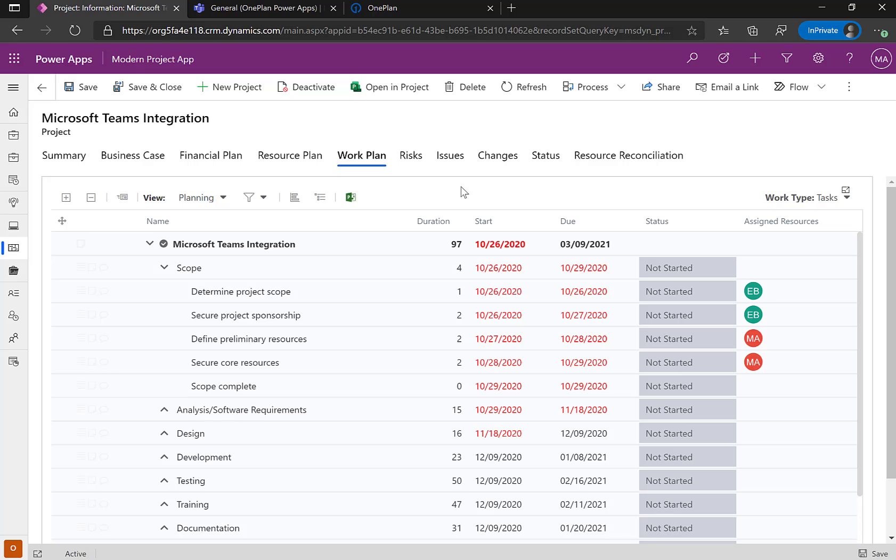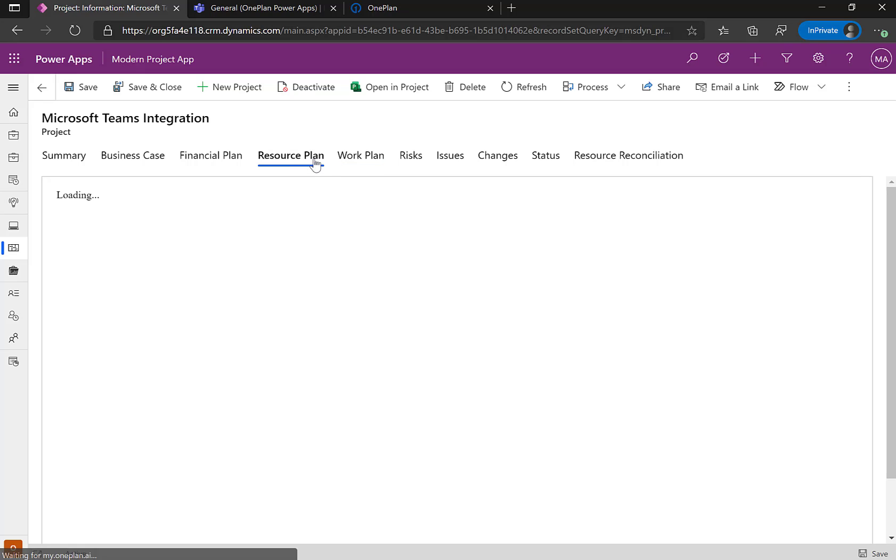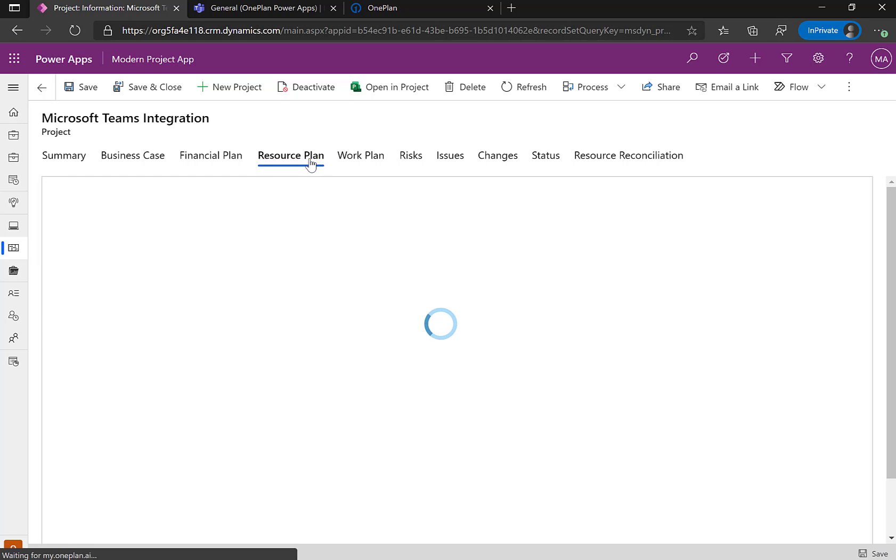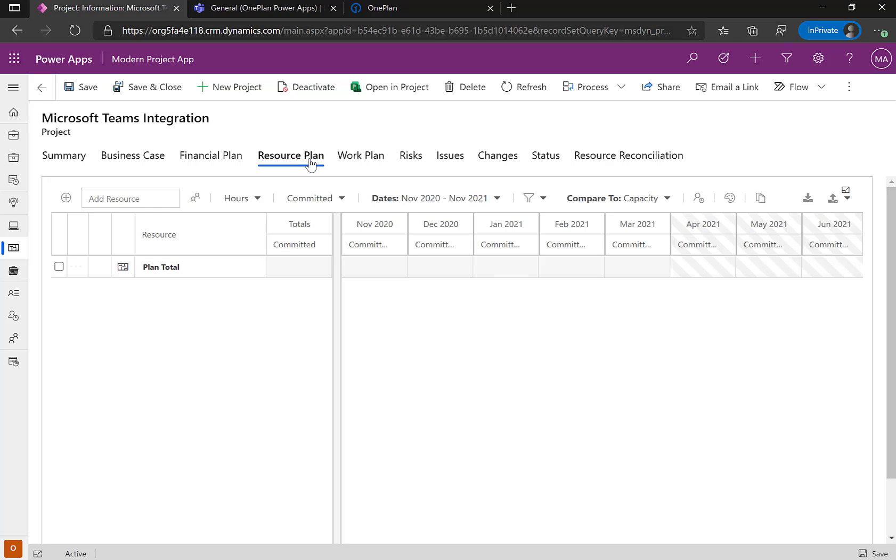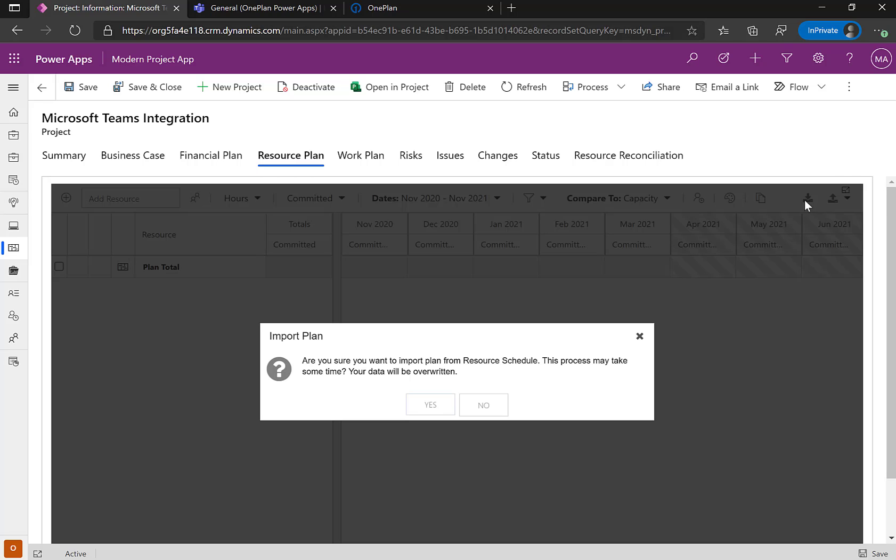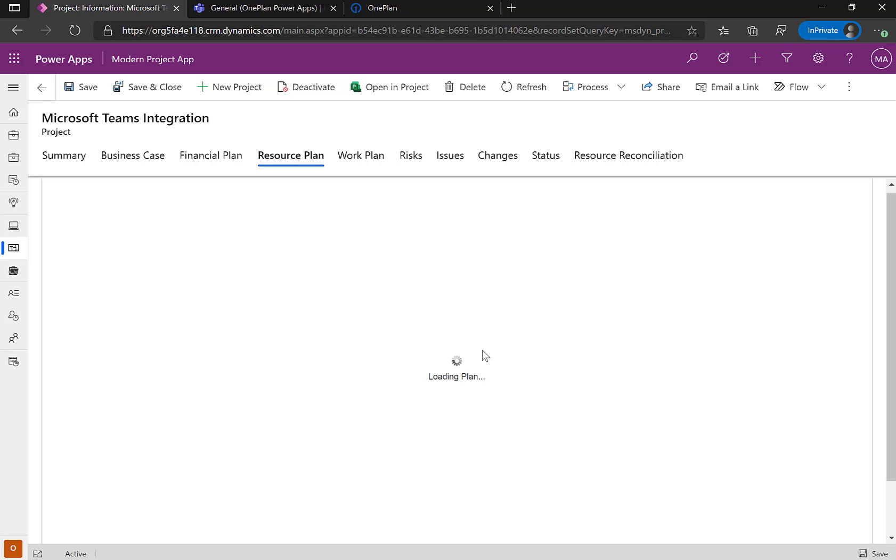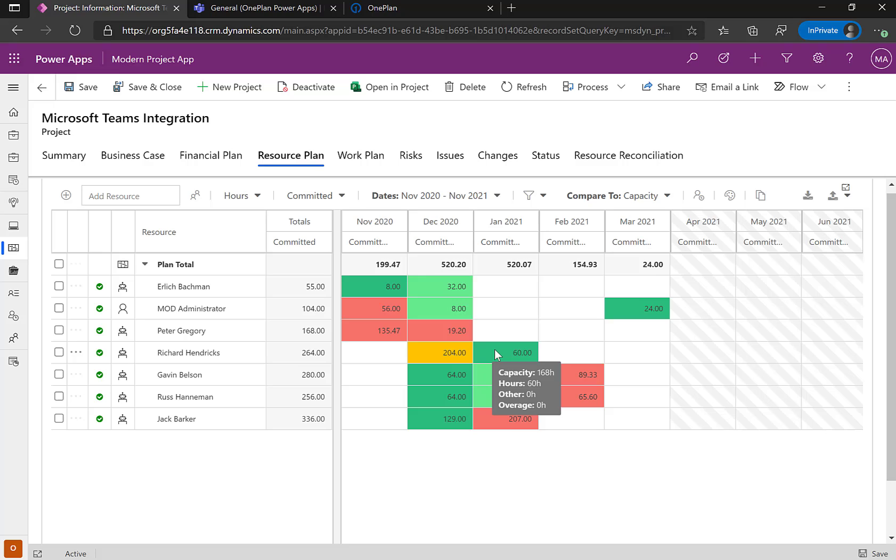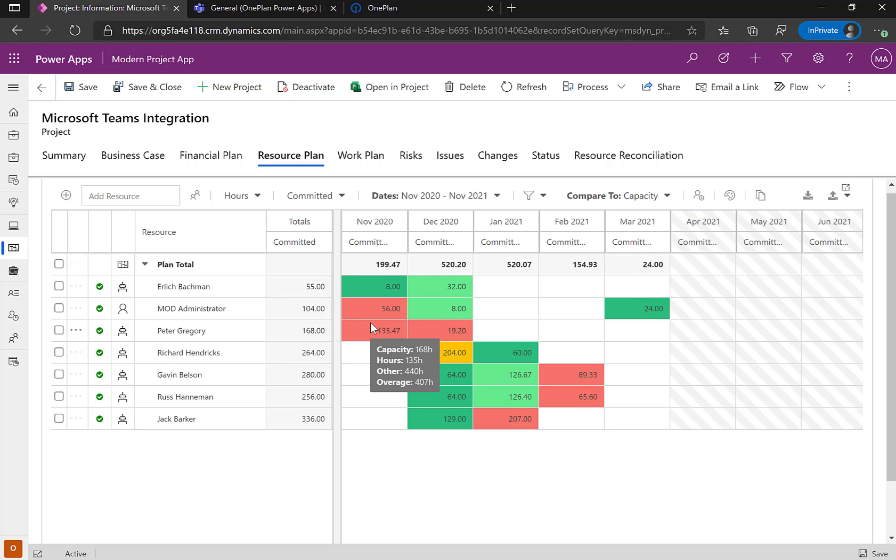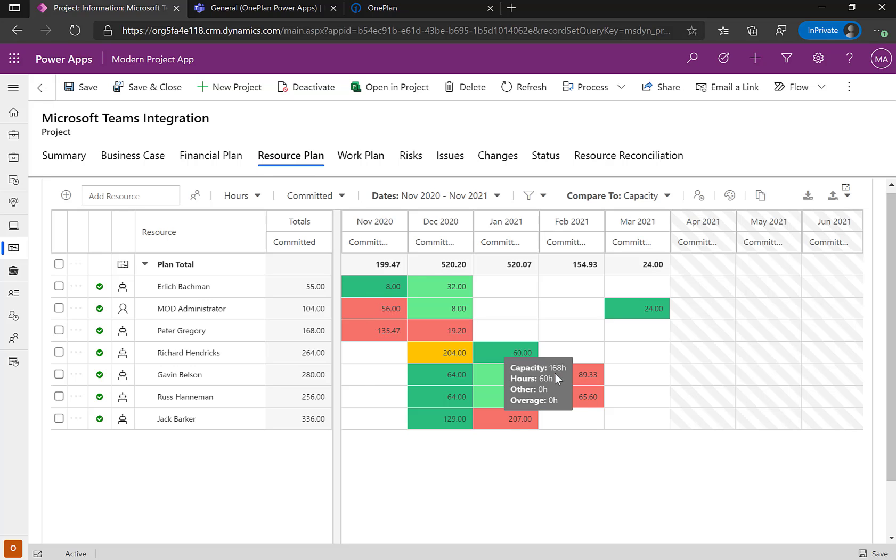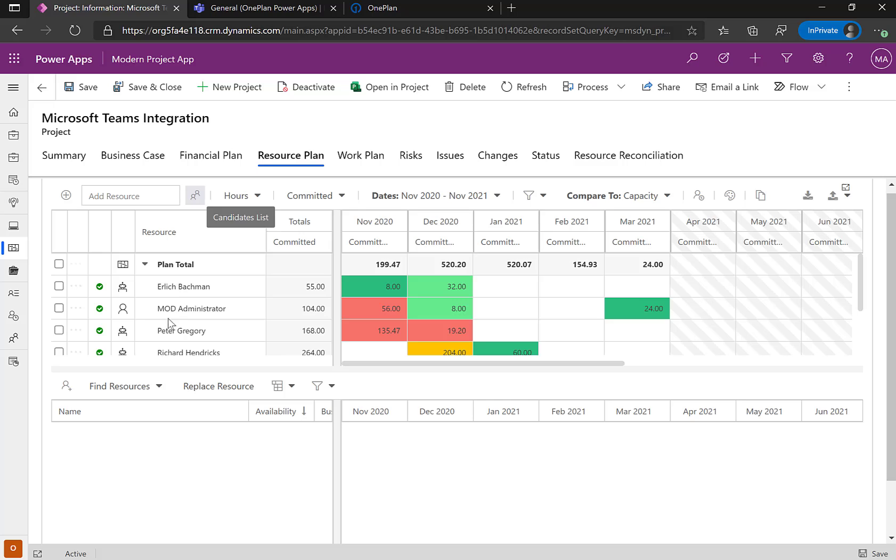The other nice thing about publishing project for the web, project desktop, or even planner into the OnePlan solution with Power Apps is the ability to do resource management. So I can come over to my resource plans and I could either have it auto publish my resource plan into here or I can actually import it on demand. So right now I need to build out my capacity plan. I can click on import. And this is going to take the information that's from the Microsoft project file and actually populate it into my capacity plan.